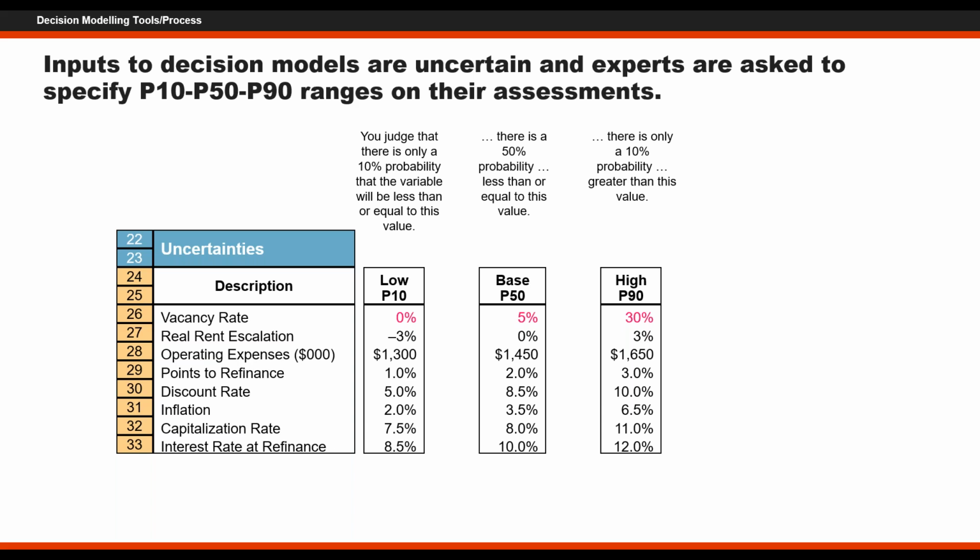Don't think of this as separate from data analysis, but the data analysis should be thought of as informing the judgment, because all decisions and risks that we're trying to look at are in the future. And the number one question you have to ask is: is the future like the past? Some of the biggest mistakes in the financial services industries have been made by taking a large amount of frequency data over short periods of time and confusing the volatility with long-term risk trends. It's kind of like the bounce of the needle as opposed to is the needle slowly shifting.